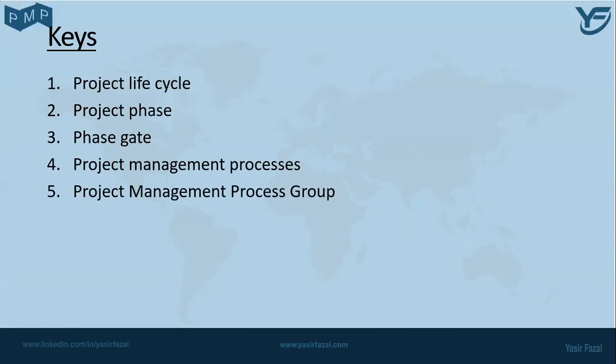After that, we have project management process groups. It's a logical grouping of project management inputs, various tools, techniques, and resulting outputs. The project management process groups include initiating of the project, planning of the project, execution of the project, monitoring and controlling of the project, and in the end, in case of success or failure, closing of the project. These groups are not project phases.